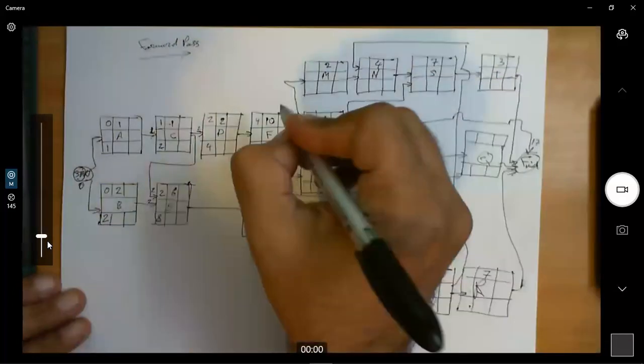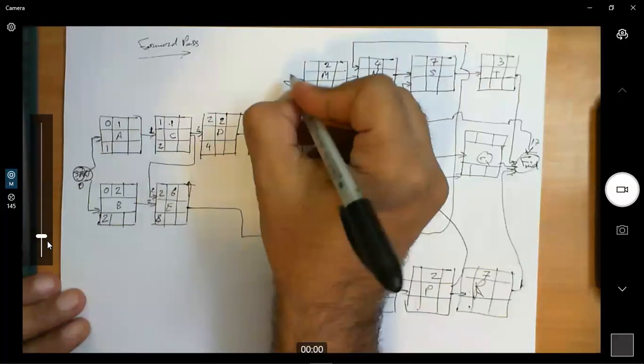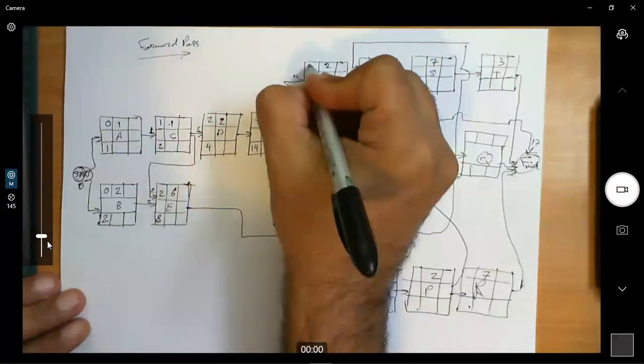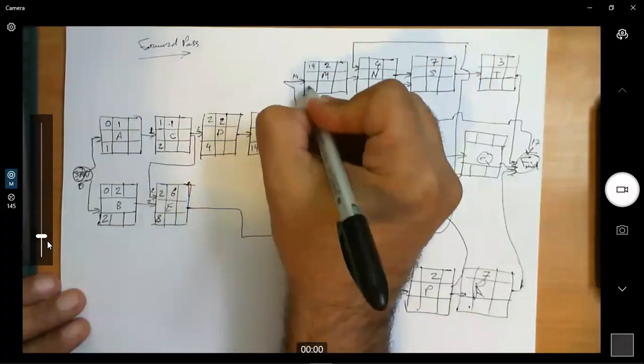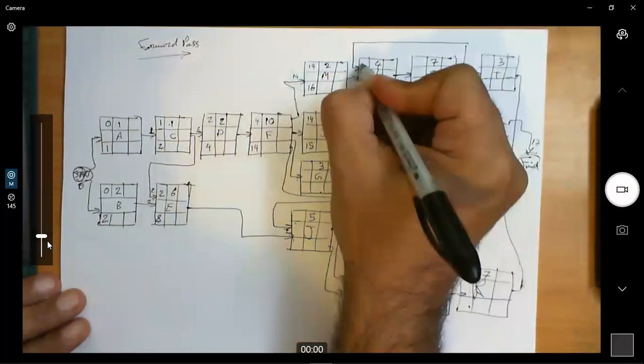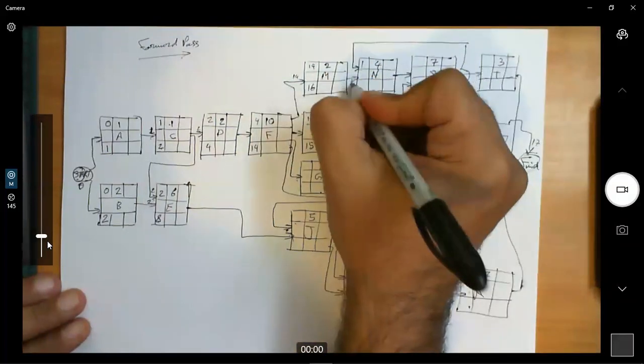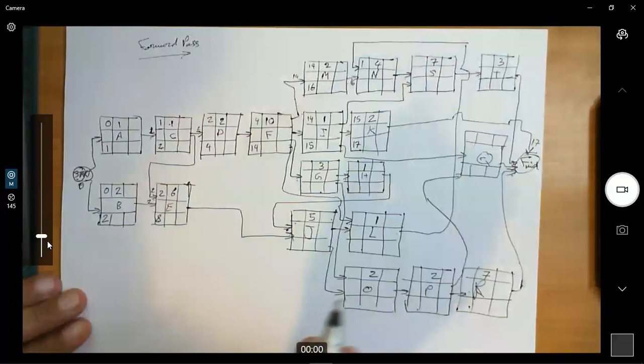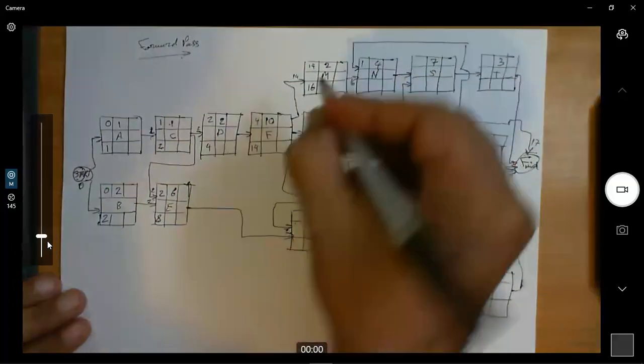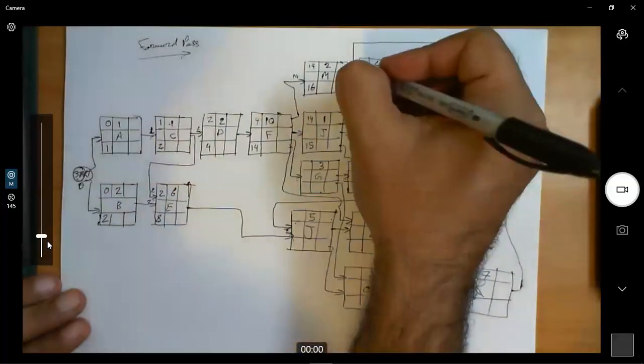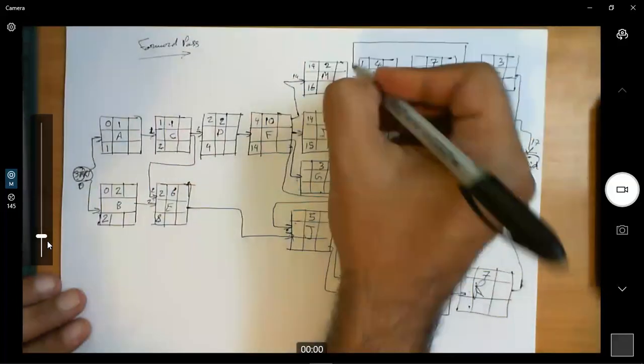Then here we go with 14. So we have here 14. 14 plus 2 is 16. Here we have 16 from this point. Okay. We are not gonna start on this until we find out how much this arrow is gonna bring in.